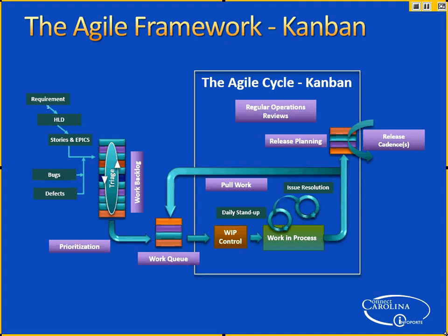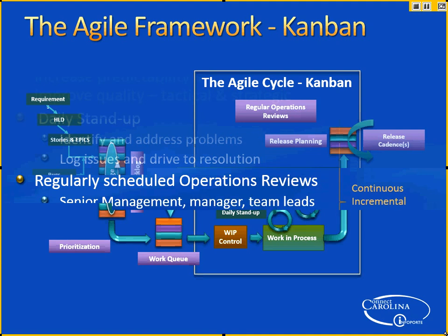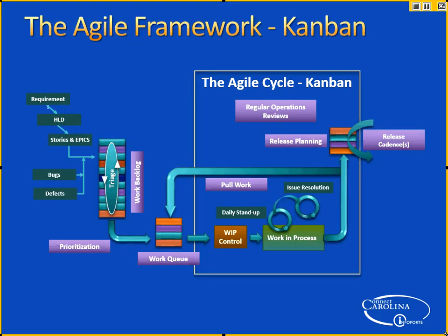So, interesting though, I thought you would pull the work from the work backlog. No, you pull the work from the work queue. Right. There's a prioritization effort. Okay, so let me try this. There's the work backlog that's being fed in, right? Maybe every day, periodically, there's the triage. This one goes bye-bye. That one goes bye-bye, so it'll come by things, right? But so now I've got a triage backlog. But now it comes to whatever is the time that we've set for doing prioritization. And now, in prioritization, we're going to look at this, and we're going to agree what are the next highest priority things to get done that we should put into the queue for the team to run.